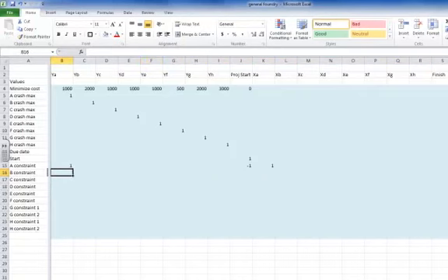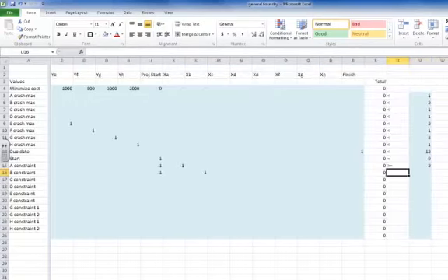So now I'm going to work out the same formula for each one of these. So for my B constraint, I'm going to have a 1 here, and again, because it's the project start, a -1, a 1, greater than or equal to 3.